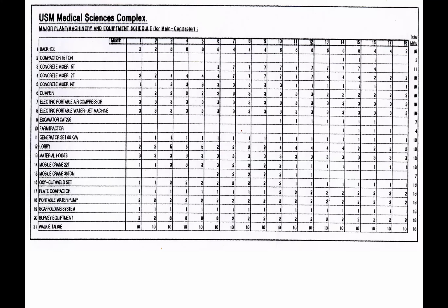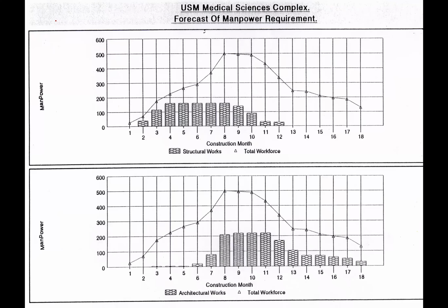Okay, and then this is for machinery. As I mentioned to you, you can do resource leveling and smoothing on machineries and manpower. Why not on material? Because for material, there are a lot of types of material, so it's too much work. And then see, this resource histogram looks very nice: a peak and then a gradual decrease. Why does it look very nice?